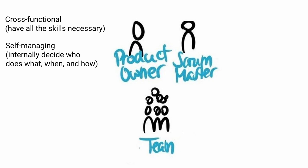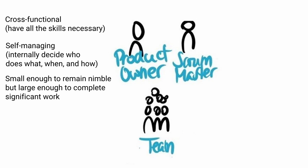Smaller teams communicate better and are more productive. If Scrum teams become too large, they should consider reorganising into multiple cohesive teams each focused on the same product and sharing the same product goal, product backlog and product owner. They are structured and empowered by the organisation to manage their own work, and the entire team is accountable for creating a valuable, useful increment every sprint.